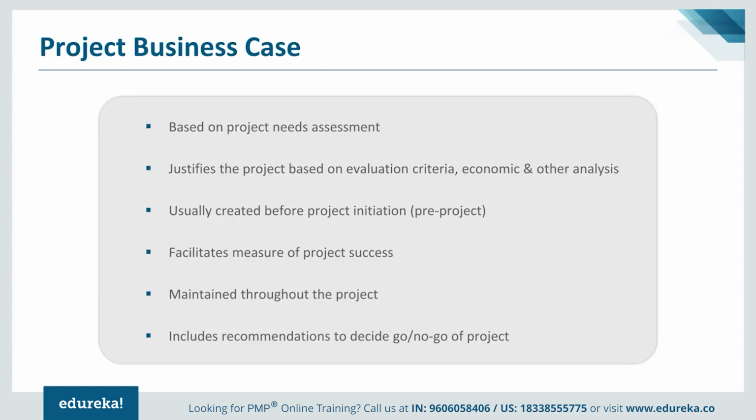I can see here that Savita has a question: who prepares the project charter? This is a good question, by the way, because I have seen this question sometimes in the examination and people get confused. Sometimes I've seen people writing that the project manager is the one who will create the project charter. But don't forget that the project manager is given a project charter, which means somebody else has prepared it. In this case, it's going to be the sponsor of the project who will be creating the project charter and handing it over to the project manager, which authorizes the project manager to kickstart the project.